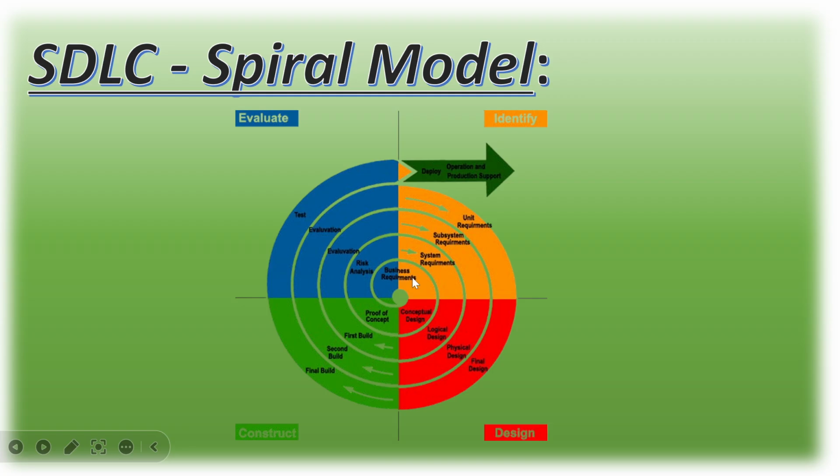Here you can see we have started with module A. We start the requirement analysis, then we do the design, and then we do the coding, and then we do the testing of module A. Once that is completed, we'll deploy and start module B. So module B requirement analysis will start, then we'll design module B, then start the coding for module B, then do the testing activities for module B, and deploy.